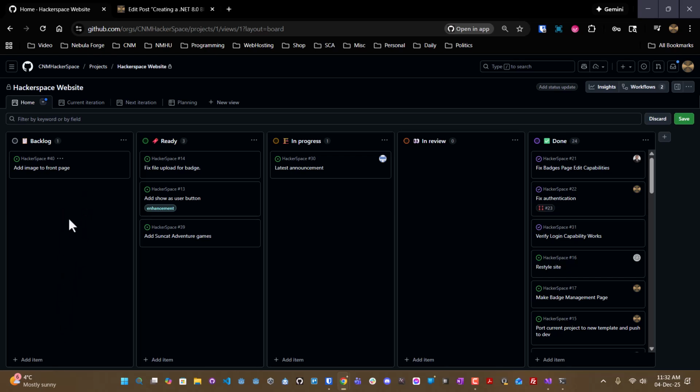If you're in a meeting and people start going on and on about how to implement a particular idea, and you just want to collect the ideas, what you do is use basic brainstorming techniques. You say, hey, we've got an idea, we've got the user story done, let's move on to the next topic. And the idea is you want quantity of ideas more than quality at this stage. At a certain point, then you take your backlog item, and during iteration planning, you might decide, hey, that's one of the things we want to implement during this iteration. Iterations usually are 2-week periods, 1 to 3 weeks, depending on how you work.